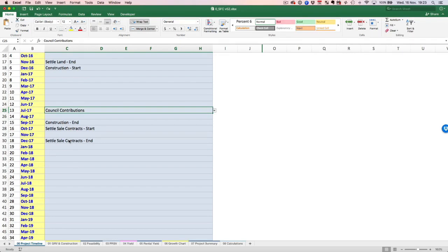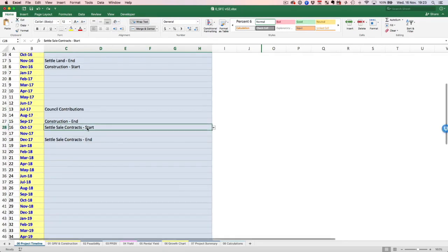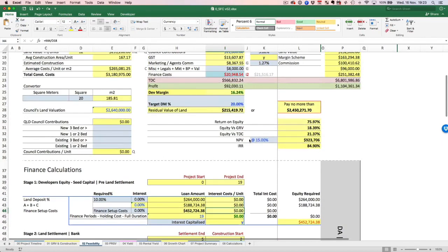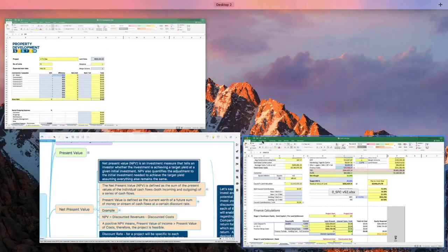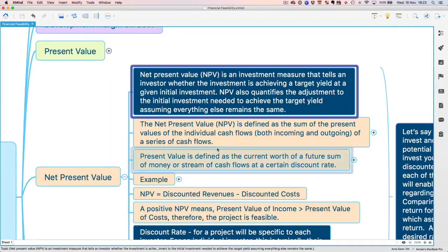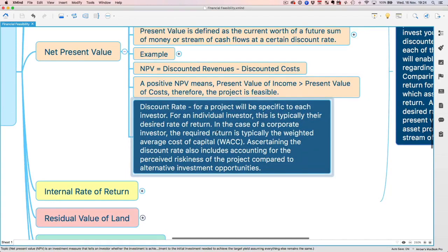So we can't actually say the 650,000 townhouse will settle on that day and on that day. So it has to be taken as a ballpark figure, where the entire money that comes in at the end of the project gets spread across 3 different periods. And that's how these NPV payments are collected. So if you want, I'll give you another example.